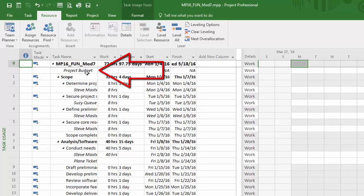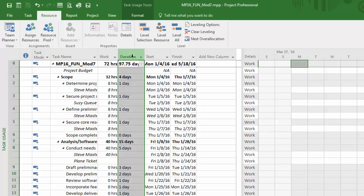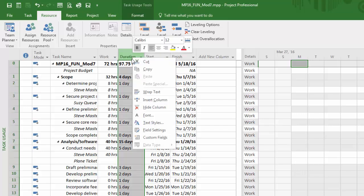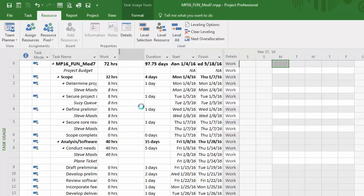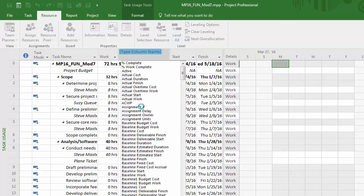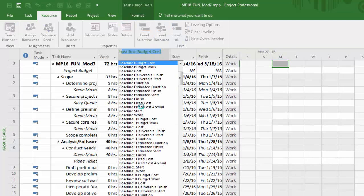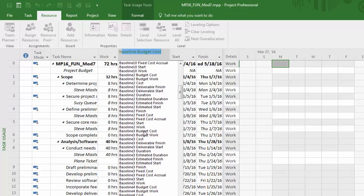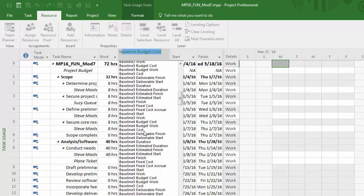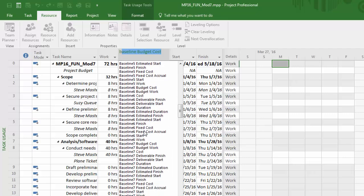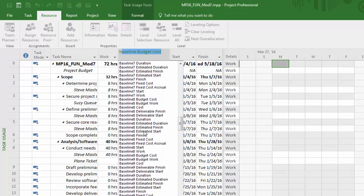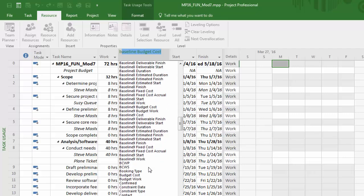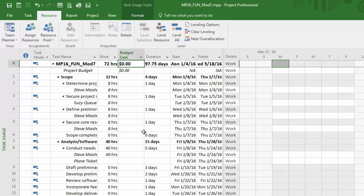Now it's very seldom that you'll be assigning resources to summary tasks, but in this case because of the way we're using this resource, it's appropriate here. What I'll do is right-click on that column again, insert column, and bring out that same field in this particular view, which is my budget cost column.